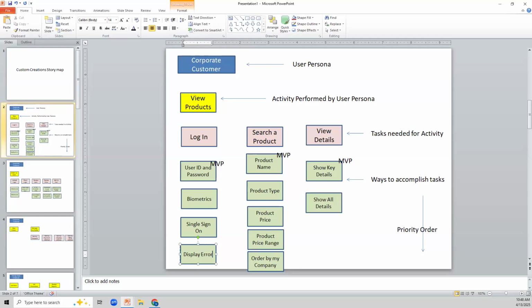So whether you do story mapping or put all the requirements in a Word document, the process is still the same. In Agile, it allows me to keep expanding the story map as I learn more. Versus in waterfall, I'll ask all those questions and document all of them in a single place.